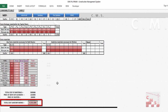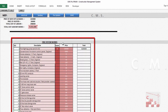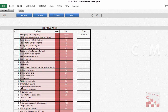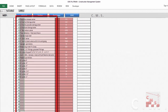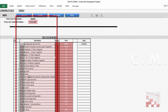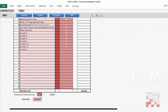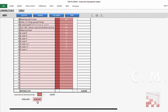CMS also provides a facility to find an indication for the fire system. It covers most materials used in fire fighting and fire alarm. Add the quantities and prices, then add installation and commissioning as a percentage of materials — which is common market practice. At the end you'll have the full price for the fire system, fire alarm, and firefighting, or you can add the price directly from the subcontractor.